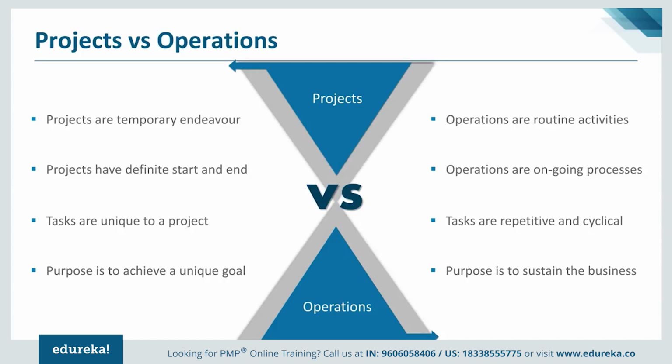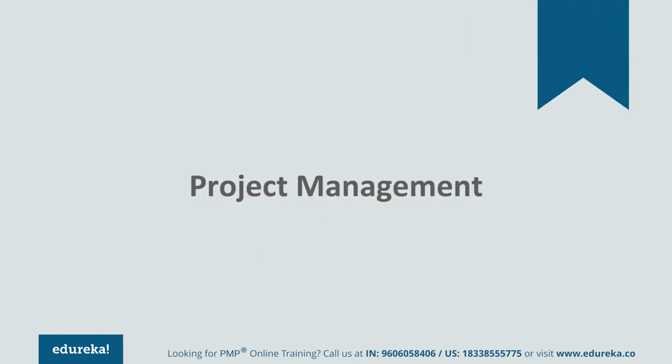So key here is to make sure that there is a proper handover between the project activities and the operation activities. And therefore, you will find that the operations team works very, very closely towards the end of the project. Not only that, these days we ensure that the operation team is involved very early in the project itself, so that they would know what project we are working on and what product we are creating. So both the activities are certainly important, project as well as operations, but they certainly differ in terms of why they are performed as well as the characteristics that they possess.